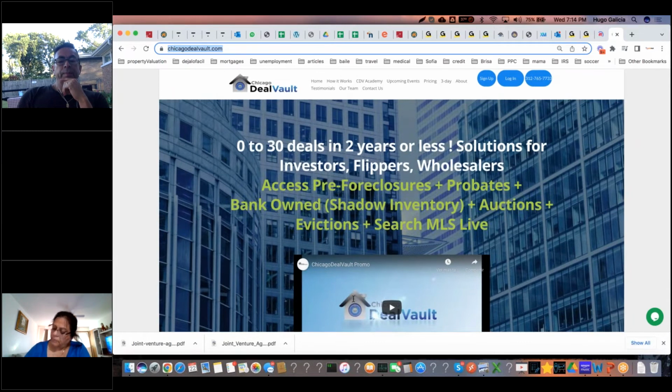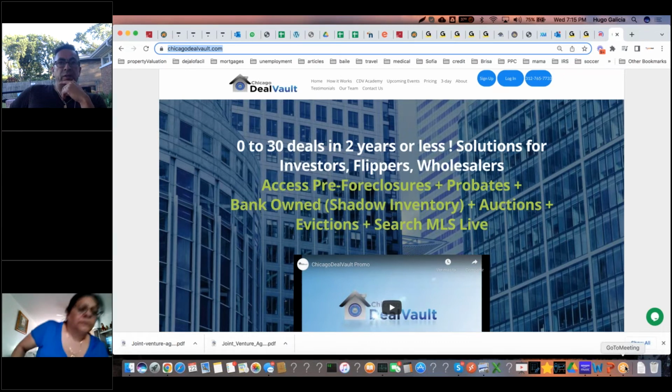Okay. Hugo, I have a question. How do we handle a situation where the contractor says, well, we need some type of money up front to buy the materials? Oh, I tell them I'm going to pay for the materials, and then I have them go to Home Depot for materials. Oftentimes, we need to go to Floor and Decor for certain flooring, like for instance for the backsplash, we like Floor and Decor, but we always pay for the material. You always have to pay for materials, otherwise they're going to ask you for money up front.